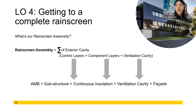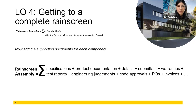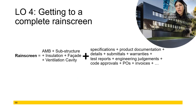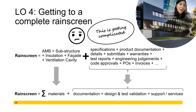The rain screen assembly is the sum of the exterior cavity — our control layers, component layers, and vent cavity. If I were using the Frankenstein method, conservatively I'm working with four manufacturers: air and moisture barrier, sub-construction, continuous insulation, and the facade. Odds are you'll have more — maybe a fastener person or two or three sub-construction manufacturers. Every time you spec something, you need a three-part specification, product documentation, details, submittals, warranties, test reports, engineering judgments, code approvals, and purchase orders. Now you need to do that for each of those four manufacturers. And there's a chance somewhere in that pile of work there's a statement saying you can't use this air and moisture barrier behind this particular cladding — but how would you know? It's buried. That's a lot of legwork and a lot of different people to coordinate, and that's just for a homogeneous building, which is rare nowadays.